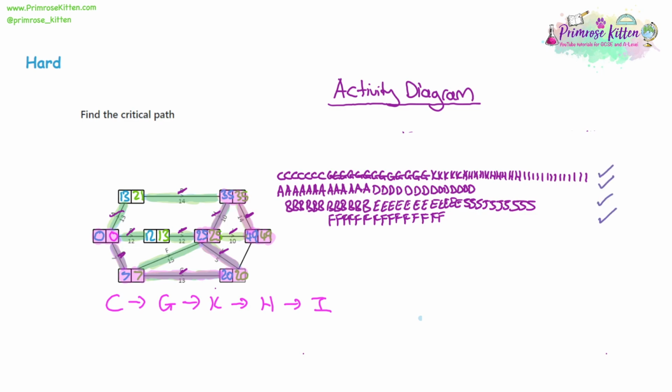Okay, the big thing here is it needs to be drawn to scale, so each letter has to be lined up in a column. You'll be given a grid to put this into. You have to do it. And it probably won't be as wide as 49, so you'll probably have an easier time than I just did. And also, you'll usually want to do a Gantt chart before the activity diagram, so you can visualize better where each task could potentially go. So then for the activity diagram, you can have a go at allocating the time.